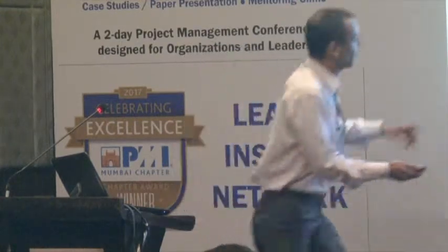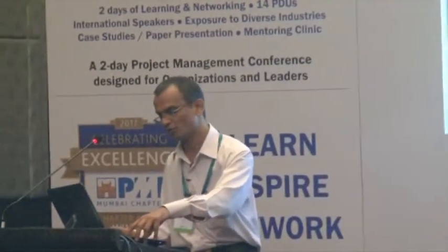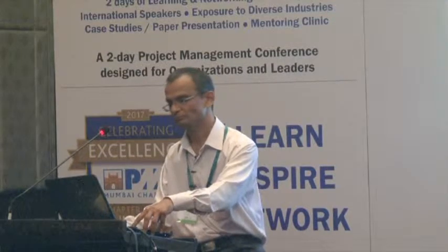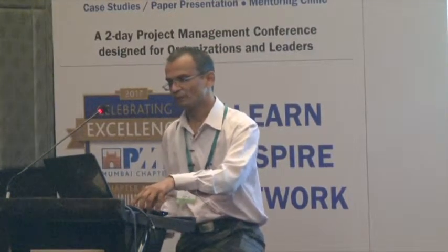So now I started capturing scenarios. I'm only capturing this column, which were the critical tasks, and what was my project duration in that scenario. So one picture I captured with 43 weeks. Now let me keep on doing this. And this counter counts 45, so that means I have 45 scenarios generated. Just give me a minute, it will take only a few seconds to reach a reasonable number.